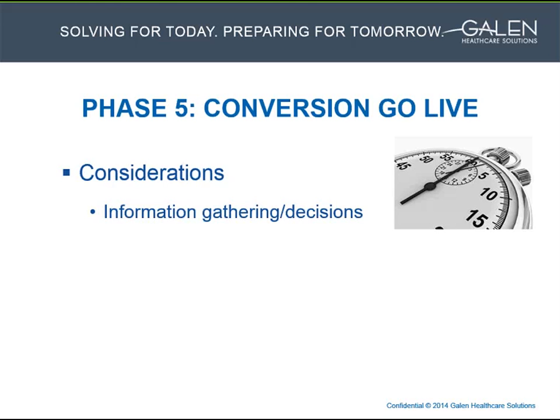The issues have the potential to impact planning for go-live. One thing I wanted to point out in our last conversion was that we had an issue with MU statuses for smoking and family history. We found that the way that they had been entered in the legacy EHR really couldn't map over to the MU compliant selections in the target system, which most people are aware of what they need to be, and even create order folders in the EHR for that very specific purpose, basically.